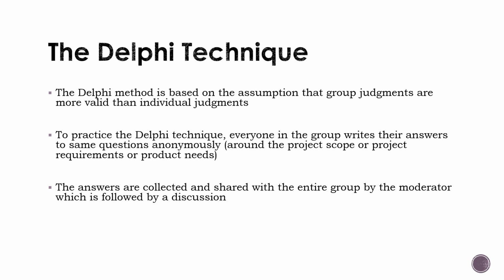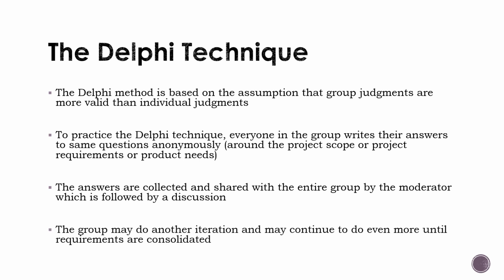It's just the answer. So let's say the sample question that we had was what should be the behavior of the product, and everyone in the group will give certain answers. As a moderator, you collect all the answers and read them out, and there could be certain discussion on those answers. What happens after that is that the group may do another iteration. They may again make use of the same questionnaire and write their answers, and they might do that again and again until the requirements are consolidated, right?